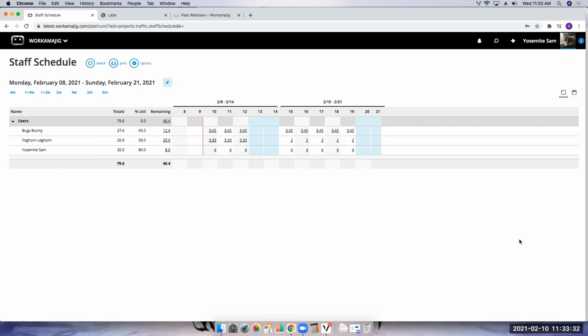If you're not really wanting to bill fixed fee, or you're wanting to bill those overages, I would say, look at it like a regular project and ask, how do you typically do that? Do you bill that project time and materials or anything like that? That would be more of a calculation, because Workamajig is just going to say, you opted on this project to bill fixed fee, which means I opted to bill those 10 hours a week or 40 hours a month or however it was. If I'm going to bill the overage, then you would want to maybe bill in a more time and materials fashion. Or again, you would have to look at your budget versus your actuals, and then you could bill the overage on that one.